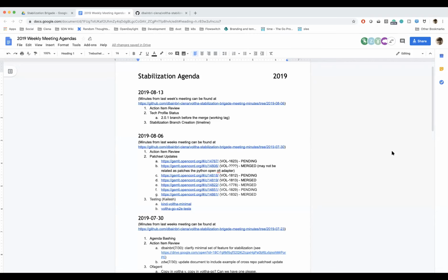Fair enough. So Zach, I think part of the question is it's not really important to create the 201 tag, in my opinion, until we're at a place where we're ready to merge TP. So maybe we just hold off on that tag until we've got double testing done and are ready to merge either eventing or TP, and then we do that tag right before we do that. How's that sound? That sounds fine. It would be good to get those patches in earlier so we can get the TP patch rebased on them. Trying to identify those early would be ideal. Yeah, okay.